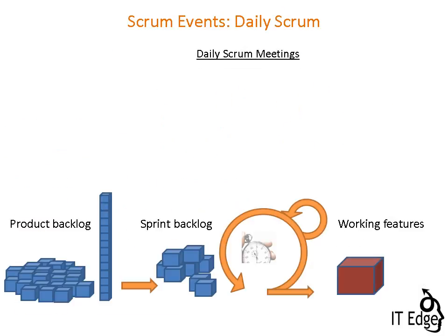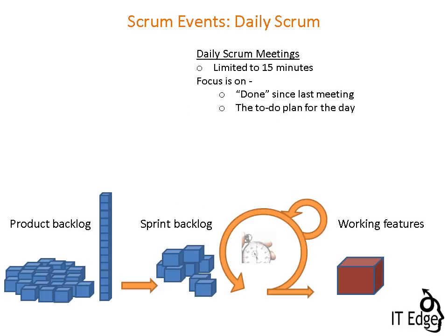Daily Scrum meetings should be limited to 15 minutes. Through these meetings, the team synchronizes itself to know who is doing what on that day, what kind of impediments are blocking the progress, and what kind of help is needed to solve the impediments. Impediments are typically tasks for the Scrum Master, who can have in the backlog the impediments he or she is working with.